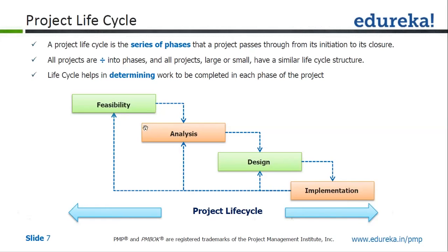So before feasibility finishes, you can start analysis. That is overlapping. At times it is sequential, in which the analysis will start only after feasibility is completed. There could be those kinds of relationships between these phases.